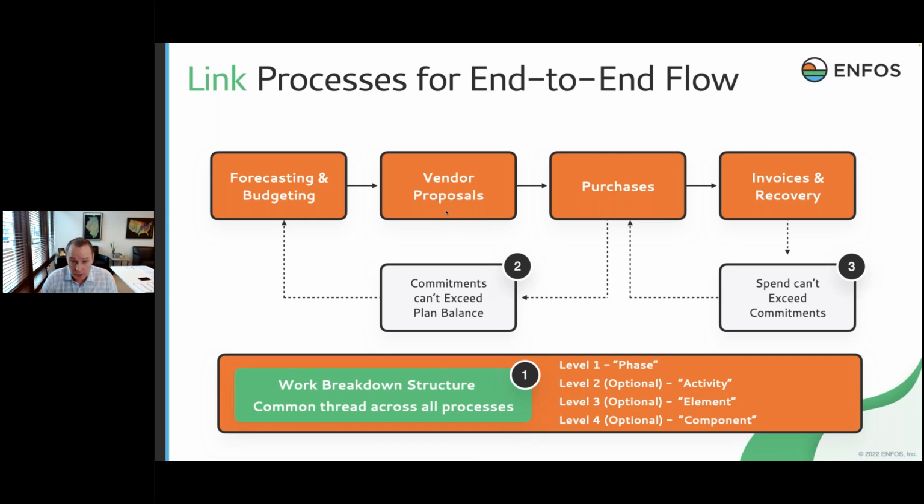An SOW, a cost estimate, whatever you want to call it, but it's a proposal that once approved results in a work commitment and then will result in spend. So I've linked purchases to proposals and proposals linked to forecasting and budgeting. I'm doing that so that I can establish and enforce cost controls throughout this end-to-end workflow, with a minimum amount of redundant data entry, consolidation of spreadsheets, extracting reports from system A to match up with reports from system B.